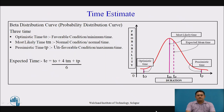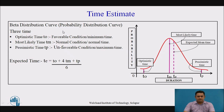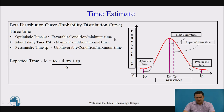The time estimates in PERT: with the help of the beta distribution curve, we define three time estimates. If we consider a single activity, it can be completed in the optimistic time — the condition where favorable conditions exist and it is the minimum time required for the completion of a particular activity.